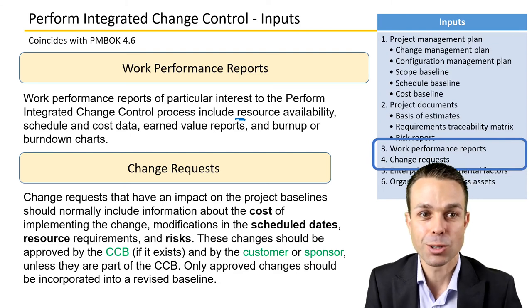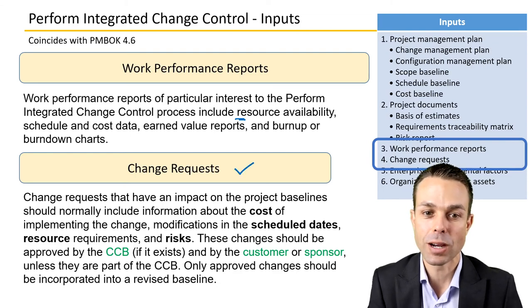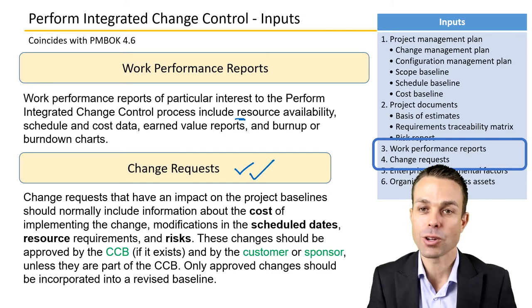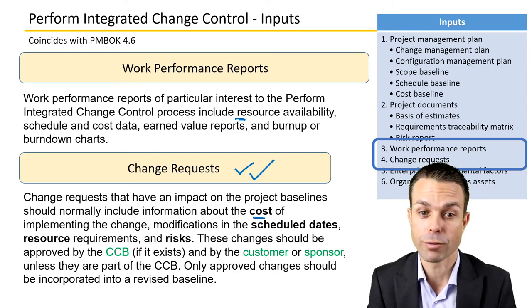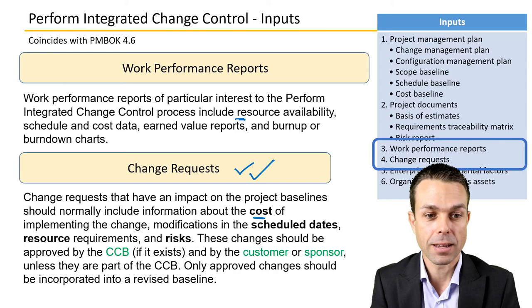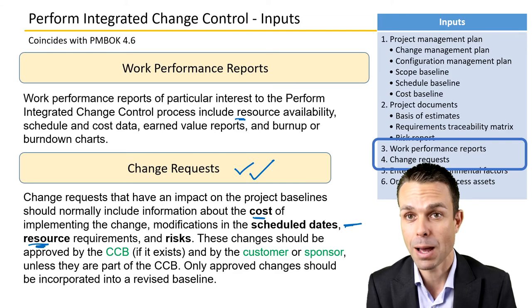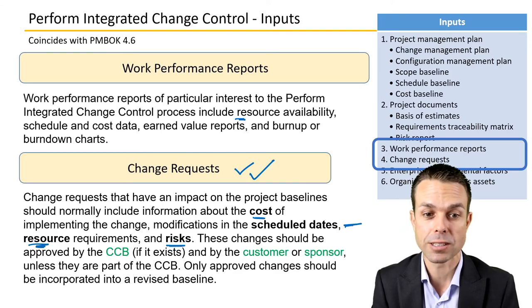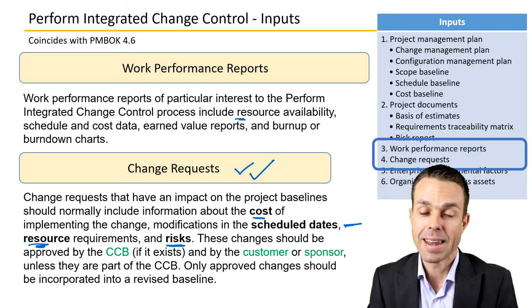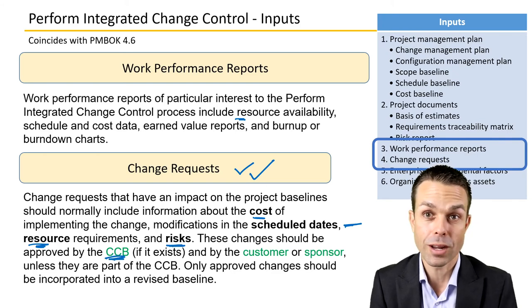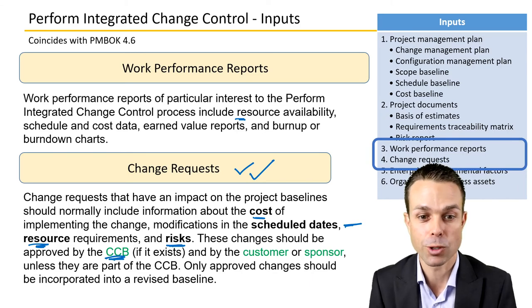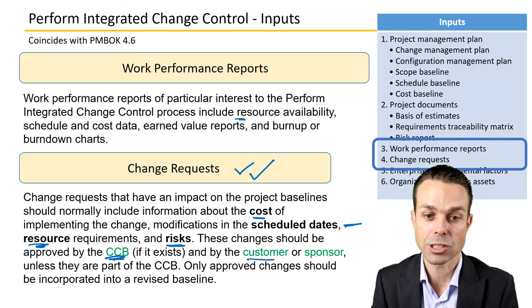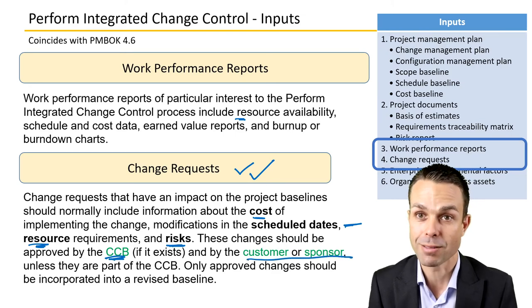The big input into Perform Integrated Change Control are the change requests themselves. They will have an impact on all project baselines and should normally include information about the cost of implementing the change, any modifications to scheduled dates, any resource requirements resulting from the change, and risks that have been considered. The change request needs to be approved by the change control board if you have one — each project is different — but it definitely needs approval by the customer or sponsor unless they're part of the CCB itself.